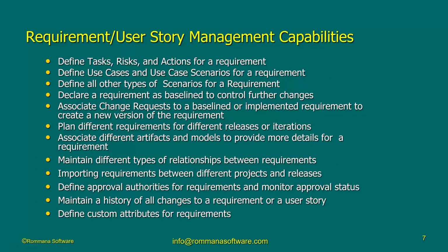As you know, requirements do not stand by themselves. Every requirement has tasks associated with it, and those tasks are things like reviewing the requirement, writing the code for the requirement, designing the requirement, testing the requirement. All these tasks are attached to the requirement, so that you can do all the project management activities there. Certainly, many requirements have certain risks associated with them that might hinder the delivery of such requirements. That's why risks are associated there. If there are any action items that must be performed in order for the team to be able to deliver such a requirement or user story, they are there.